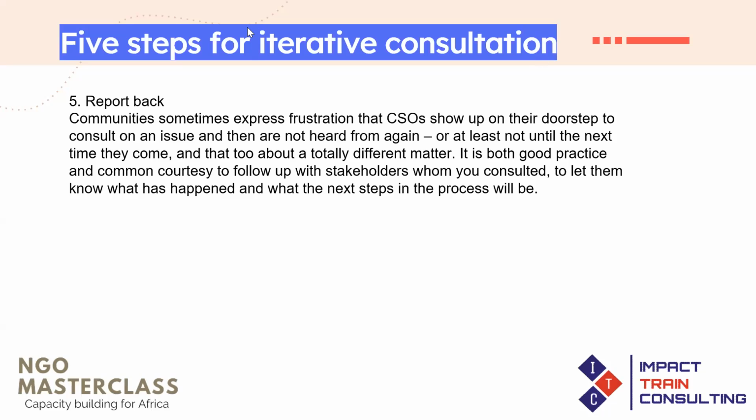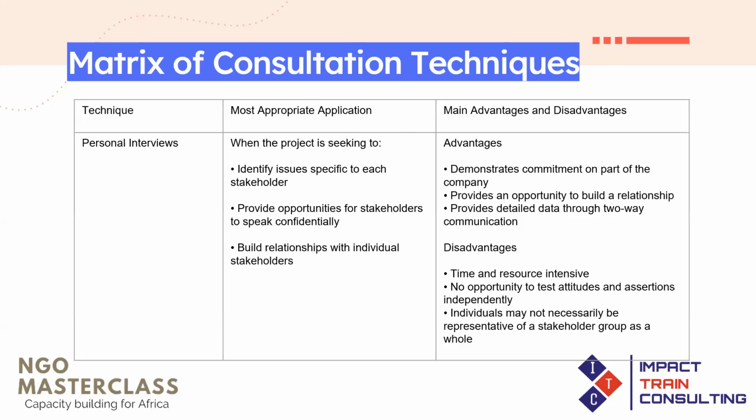Now, there are techniques that you can use for consultation. So let's look at a matrix of consultation techniques. One of the techniques you can use is personal interviews. You will use personal interviews when you're trying to identify specific issues that affect a particular stakeholder, when you're trying to provide opportunities for stakeholders to speak confidently, and when you're trying to build relationships with individual stakeholders, so you can go one-on-one. Now, what are the advantages of using personal interviews?